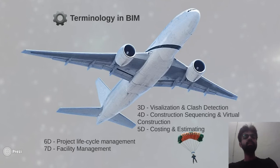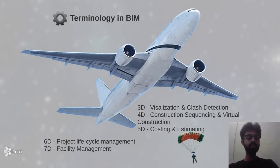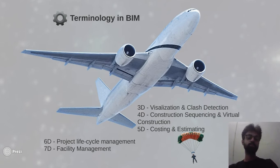There is basic terminology in BIM dimensions: 3D is visualization and clash detection; 4D refers to construction sequencing and virtual construction; 5D covers costing and estimating; 6D refers to project lifecycle management; and 7D, which is a very essential process in BIM terminology, is facility management.